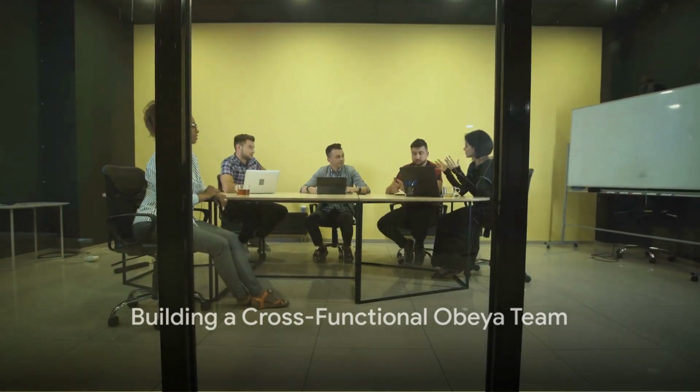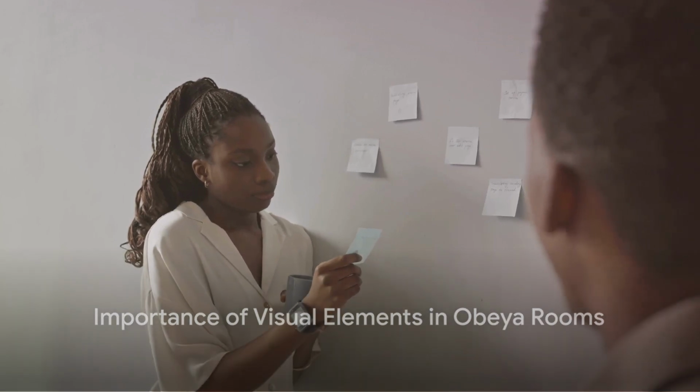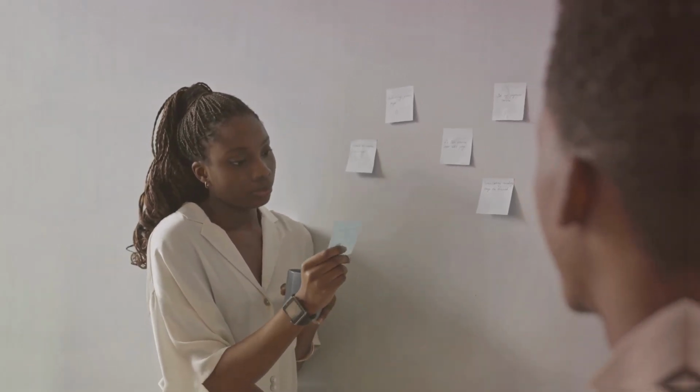Include decision-makers, subject matter experts, and those with access to crucial data. Obeyas have key sections. You'll need spaces for targets, KPIs, project timelines, problem-solving boards. Get creative. Make it visual. Charts, graphs, task boards, and images keep everyone informed and make problems easy to spot.